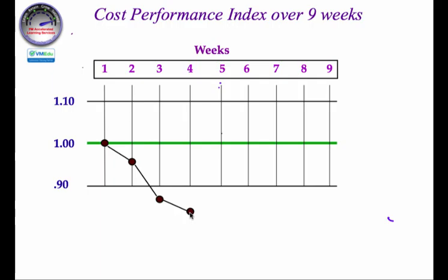Turns out we're actually falling a little bit shorter than we thought. So we estimated, our estimates and our actuals are not doing that great here. So we are well below the lower specification limit of 0.90. We're probably sitting at 0.85 or something like that, which is 85 cents on the dollar. Let's just say within our project, I'll make up a story here, 2 weeks out, not a big deal. Try to do what you can to get back.